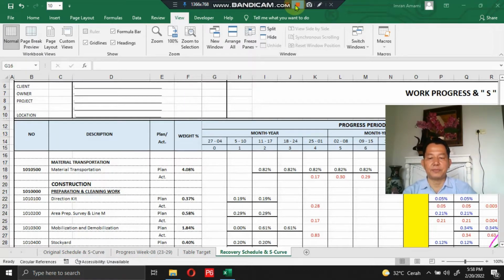In construction projects, it is no longer a secret that a company may at some time experience delays in progress, and this has many possible causes. For example, delay in the supply of direct material by clients, weather factors due to rains and others. There are changes in the scope of work, and changes in the construction drawing because it is not the same as